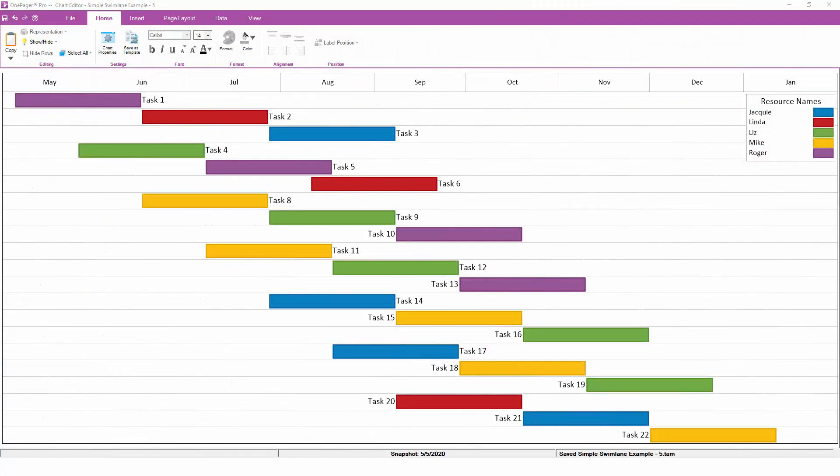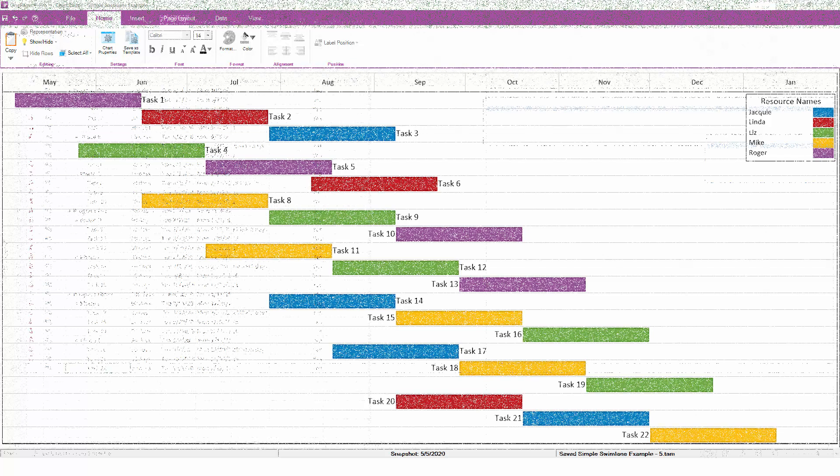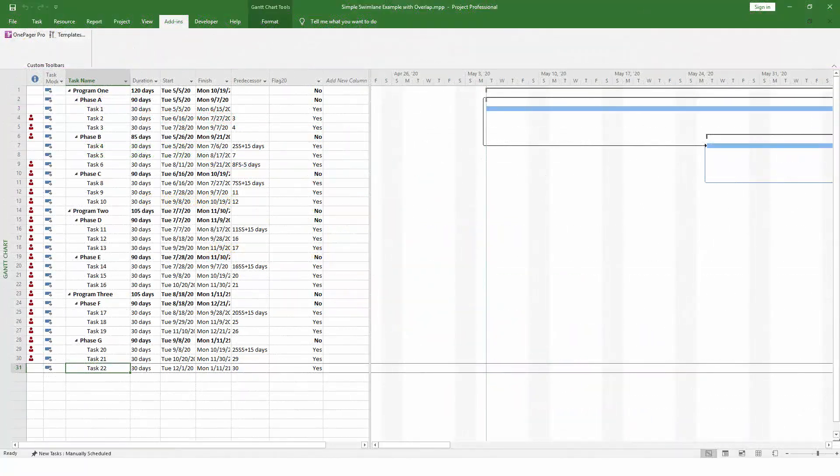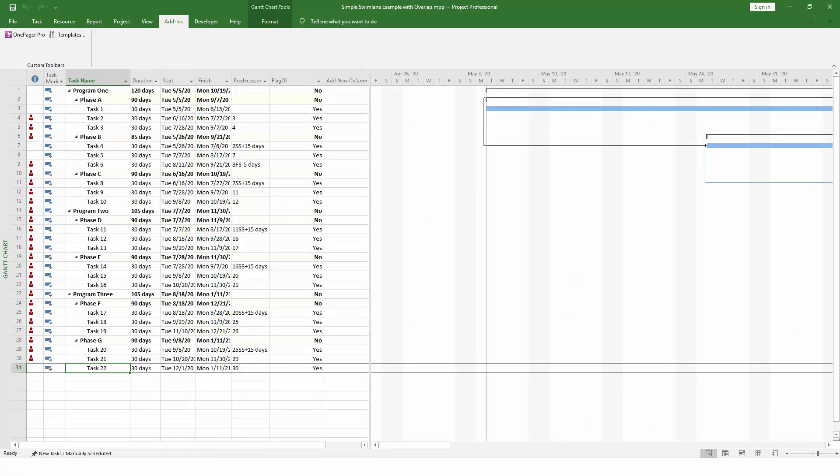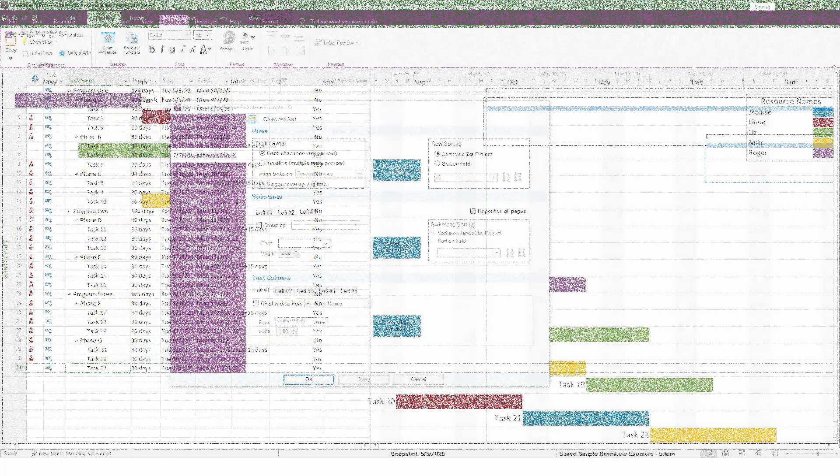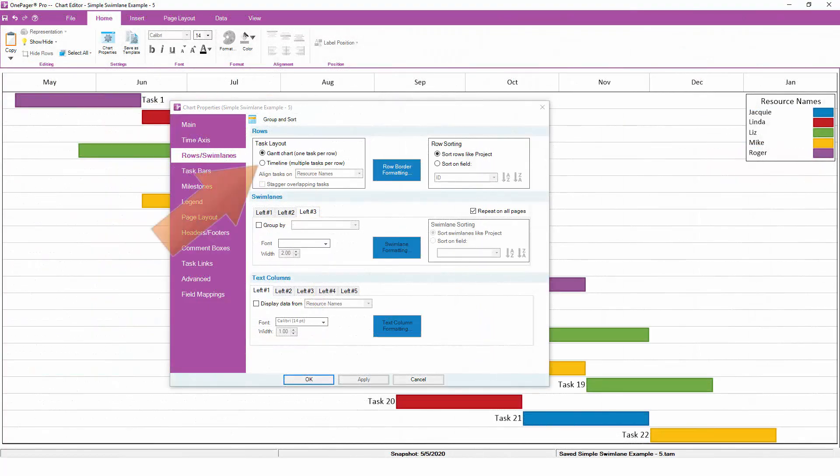If we want to create a timeline layout instead, we need to tell OnePager how to align tasks into a timeline. In other words, which tasks should be lined up with each other, and which tasks should be in their own row. If we look at the example project plan again, there are different summary tasks. The second level of summary tasks looks like a good way to create sequences of tasks, so we can tell OnePager to create timelines based on the level 2 summary name.